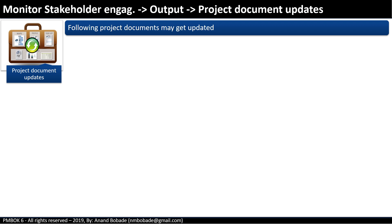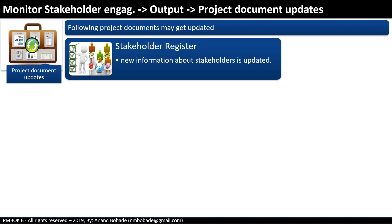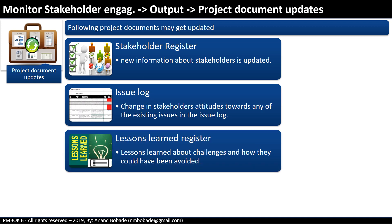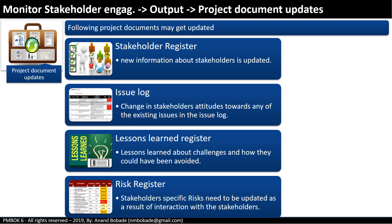Under project document updates, the main document that needs to be updated is the stakeholder register, reflecting new information about stakeholders from monitoring. If any stakeholder's attitude has changed toward existing issues, the issue log may be updated. The lessons learned register should include lessons about challenges and how they could have been avoided, as well as positive lessons from successful stakeholder management approaches. The risk register also needs to be updated with stakeholder-specific risks based on interactions.